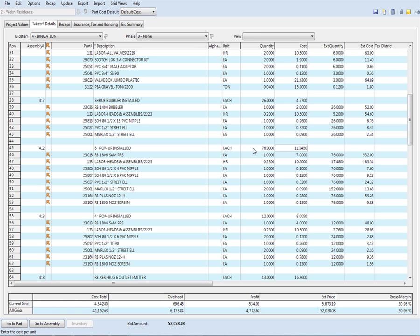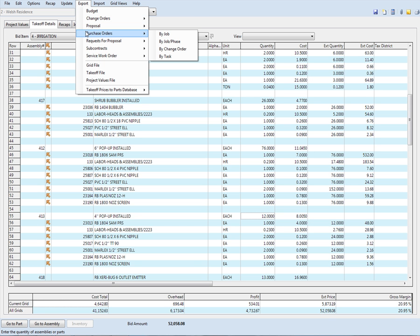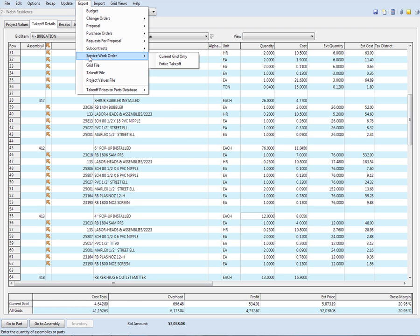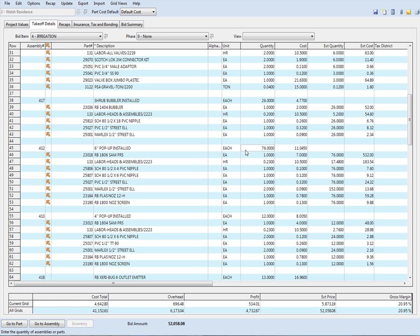So all you're doing when you're doing a new job is putting in quantities for each of these items. These can be - take ours and adapt them to yours, to your pricing, or you can build your own. But here's where you want to do it. I can take all the cost budgets to my budget by job, by item. I can print a proposal. I can print a purchase order to buy all those materials, and I can create a service work order if it's a real small job. If you have subcontractors, you could actually create a subcontract. So that's our estimating. Once you get this built, every job after that just becomes really simple. You're just plugging in quantities and maybe checking to make sure your prices are still good.